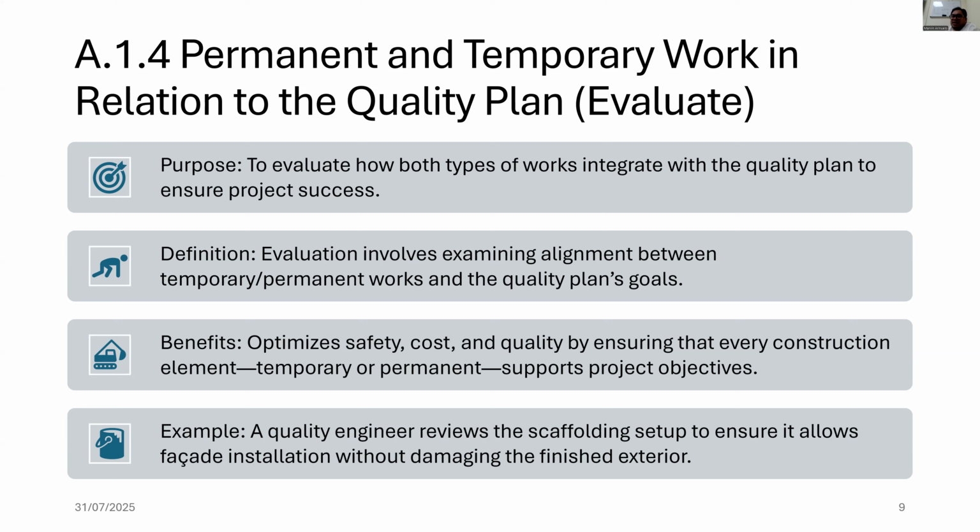Evaluation involves examining the alignment between temporary and permanent works, benefits, optimizing safety, cost, and quality by ensuring that every construction element, temporary or permanent, supports project objectives. Nothing will be missed. All of the requirements will be comprehensively determined and analyzed. Example: a quality engineer reviews the scaffolding setup to ensure it allows facade installation without damaging the finished interior.